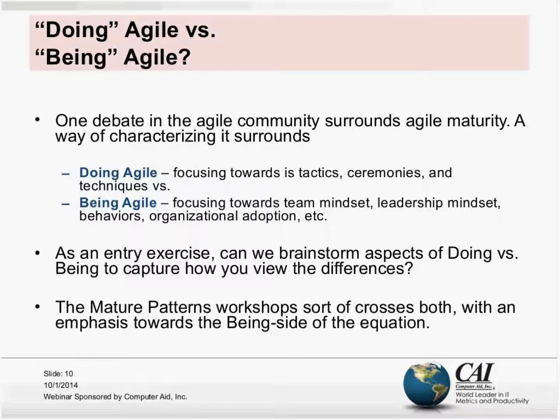If someone needs help, if someone implies while talking about their work that they're behind or need help, there's this natural reaching out within the team, where the team will help that person. People are comfortable asking for help, and people are comfortable offering help. And it's all related to the sprint goal and delivering the highest priority and highest value work first. The team works in priority order. They sort of swarm. You can hear it in the stand-up that they're swarming around the work. It's not serial activity, but swarming activity.